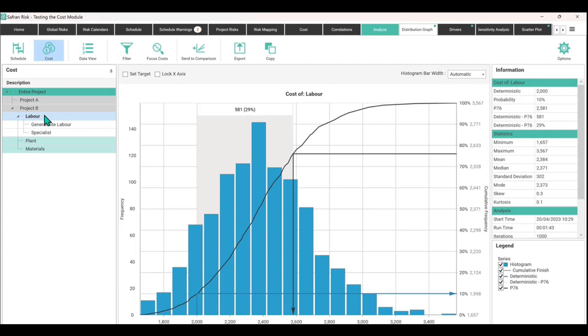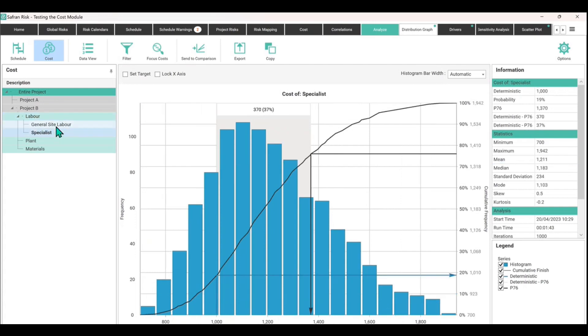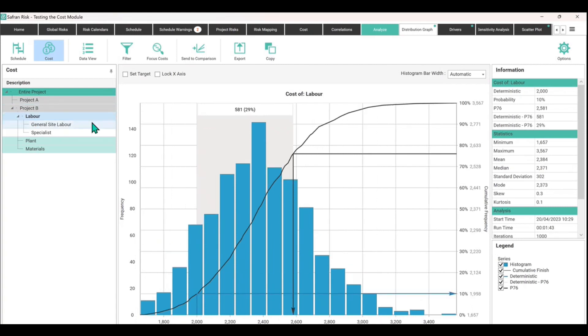You need to be able to do that kind of calculation. This is just a reminder that the only value that you can actually tangibly do that on is this one here that I'm highlighting with the mouse. It's called the mean. You can add the mean of specialists, the mean of site labor, and expect them to also equal the overarching labor sum together or the Project B. You can get all of the means together and they will total the right amount.